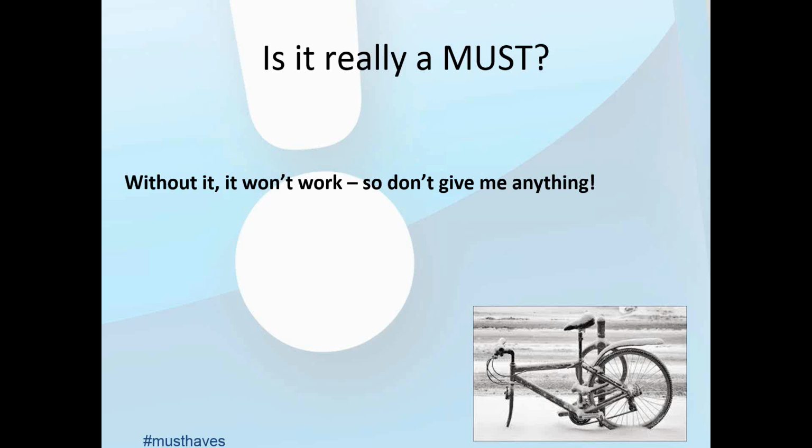And the important thing about a should is that, and don't try and decode it or give it some fancy rule about what a should is, it should be there. That's why it's called a should. But a must be there because it won't work. Now, your bells and whistles are down there in the coulds. So, killer question: without it, it won't work.